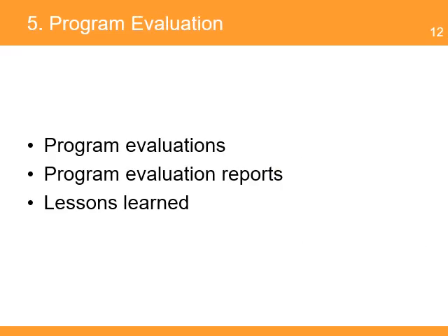Evaluation can include a midterm evaluation to measure the effectiveness of the program and determine changes to improve effectiveness for the remainder of the program. The final evaluation will measure the effects and impact of a program and draw conclusions and recommendations for future programs. This will also include the capture and dissemination of the program's lessons learned to key stakeholders.